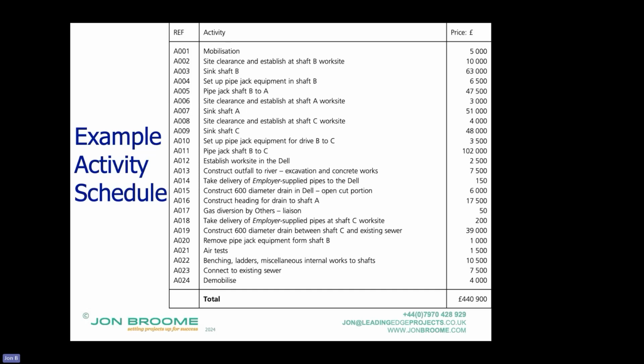So activity implies doing an activity schedule, but actually under the contract, it's having completed the activity without defects which delay or are immediately covered by following work that matters. So when I look at this, it's a bit brief on what the completed state is. I would read that to mean all air tests. If that's fine, great, but the contractor might want to be a bit more precise.